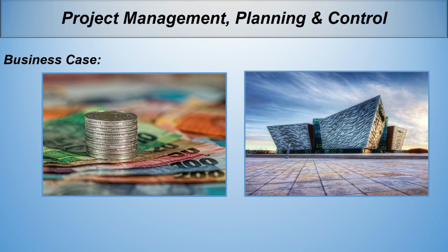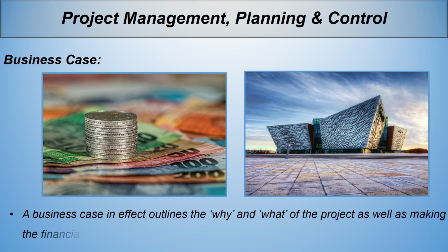This document lays out the key benefits and the main parameters of the project. It's usually created by the client or the project sponsor, and they essentially become the owner of that business case. It's their responsibility to justify why the project is worth doing. A business case, in effect, outlines the why and what of the project, as well as making the financial case by including the investment appraisal.